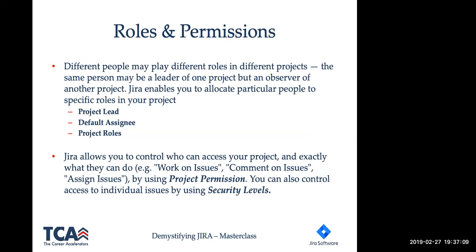The other functionality available within JIRA is security levels. So you can actually limit people's access by allowing them to access a particular part of a project. So for example, if you have issues that are sensitive and you don't want people that are not part of the project to access those issues, you can actually limit the permissions of those specific individuals. A typical example is where you're working on a project and you have some external parties or a third-party organization that you are working with. Now, you may want them to have visibility to some issues that do not contain sensitive data, but there may be other issues that you don't want them to have access to. So you can use the security level feature to limit their access.